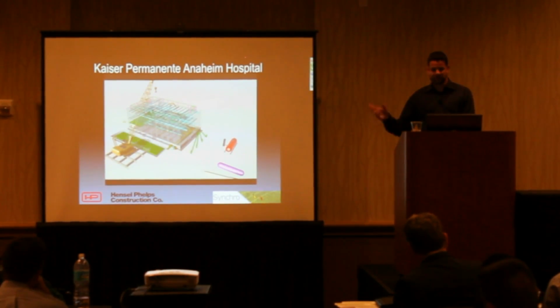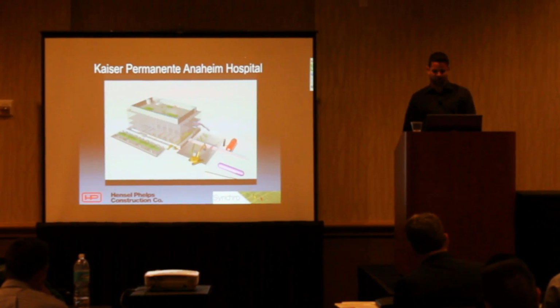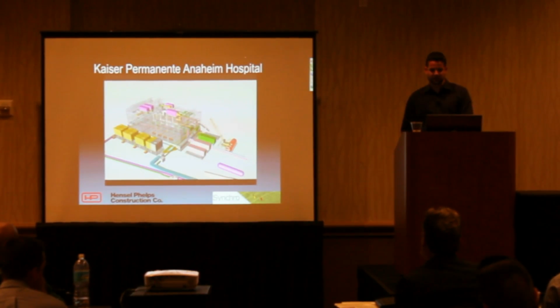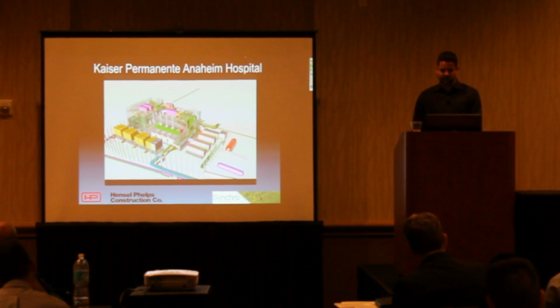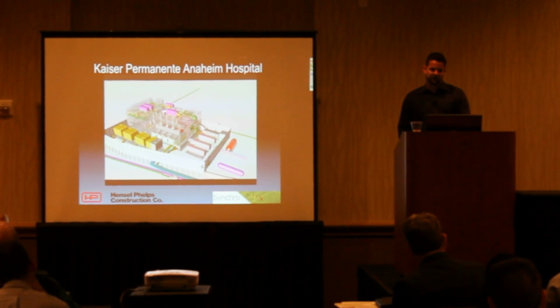So you can see some sequencing issues. You saw that excavator being right underneath the crane. Obviously, that's not going to work. So it's crystal clear when you have sequencing issues. You can see them right away. And then you got to go back to your P6 schedule and revise those. So the other great features like the equipment moving around, that took a lot of time. Linking up all of the model took about 8 hours to go through and put all that effort together, and then probably about another 8 to 12 hours to fancy it up. And when I say fancy it up, I like to get that equipment to move around and follow the sequence of everything getting built, or the drill rig, getting all the cranes and whatnot in there.